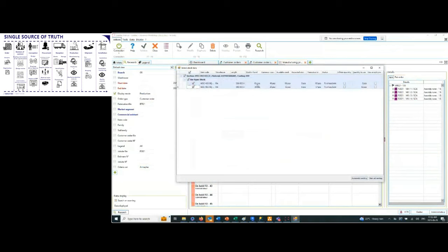Okay. Now, if you ever have negative quantities, of course, this can be avoided in the system, and you can get prompts, not error messages, but prompts to suggest that you need to purchase more material when your stock levels get to X value. So for example, if this is a common bar element that you use frequently, and you only have 5 left in stock, we can have automated messages appear to suggest that you need to procure this material